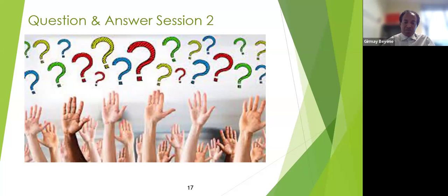That way, when we come back to review the project files, we know there was no work on that day, and it's not the agency's fault. So if there are any claims or any issues, safety issues at the job site during that day, then you have some information to come back and check. So it's a good idea to document that in a daily report, but it could be blank, just with some notes and date.